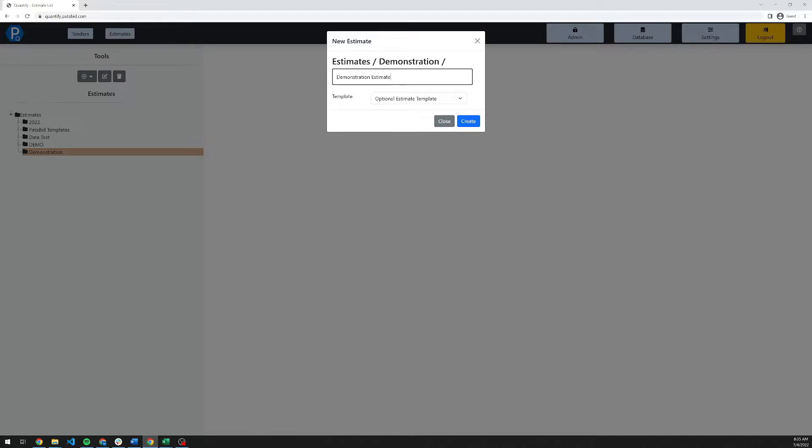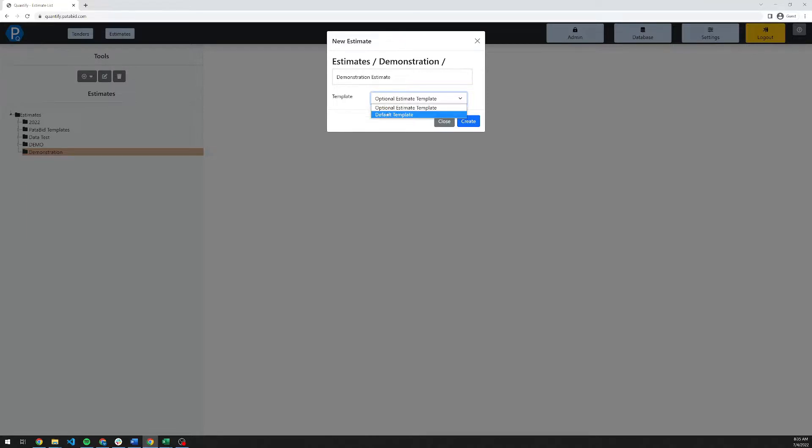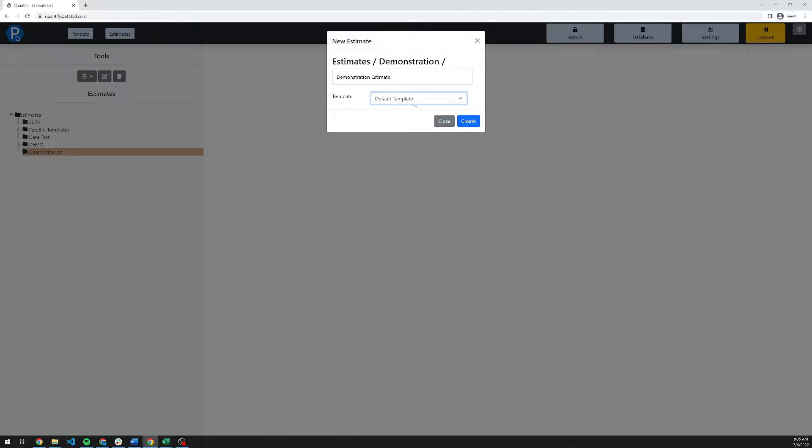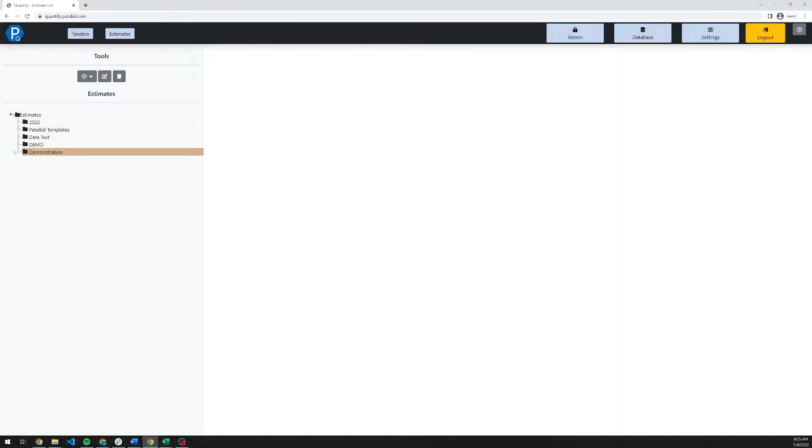When you create an estimate, you can select a template to create it from. This will copy certain things in, the key items being the breakdowns. If you have a specific client that likes things a certain way or a company standard for breaking down estimates, you can create a template for that. There is a default template that comes with your initial account signup. I'm going to use the default template when I create this estimate. We'll hit create and then expand out the folder.